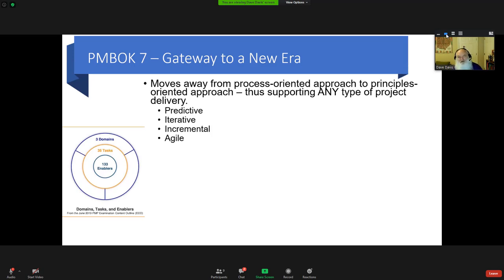And there are these 4 different types of projects I've already talked about a little bit. Iterative and incremental, I think I get into those as one of them is a fixed time block that every 3 weeks, every 2 weeks, something will be delivered. The other, the incremental, is based more on functions. It may take us a certain amount of time, say in a change management process, in order to develop some sort of communication to our users. And then there may be different training pieces. One may take 2 weeks, one may take 4 weeks, but they're increments in which it's delivered as opposed to a fixed time.